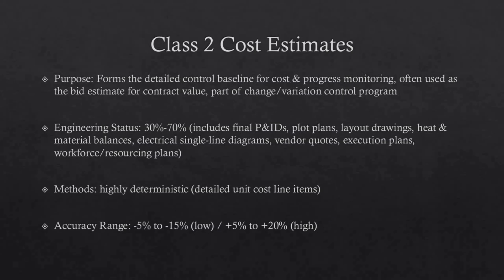Class 2 estimates are generally prepared to form a detailed control baseline against which all project work in terms of cost and progress is controlled. For contractors, this class of estimate is often used as the bid estimate to establish contract value. Typically, engineering is from 30% to 70% complete and would include at a minimum: process flow diagrams, utility flow diagrams, piping and instrument diagrams, heat and material balances, final plot plan, final layout drawings, complete engineered process and utility equipment lists, single line diagrams for electrical, electrical equipment and motor schedules, vendor quotations, detailed project execution plans, and resourcing and workforce plans.